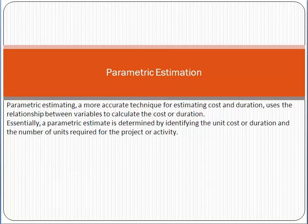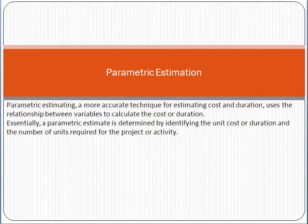What is parametric estimation? Parametric estimation is a concept of estimation based on some calculation and based on some parameters. It is a more accurate technique for estimating cost and duration, and uses the relationship between variables to calculate cost or duration. A parametric estimate is determined by identifying the unit cost or duration and the number of units required for the project or activity.